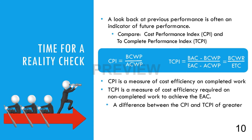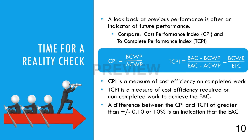A significant difference between the CPI and TCPI does not necessarily mean that an EAC is incorrect and must be changed, nor is the lack of difference a sure sign that the EAC remains valid. However, a difference is an indication that an EAC should be reviewed for realism. If, despite the difference, the decision is made not to update the EAC, then a logical and valid justification should be documented. Simply stating that there will be future efficiencies or that performance will improve is insufficient justification.